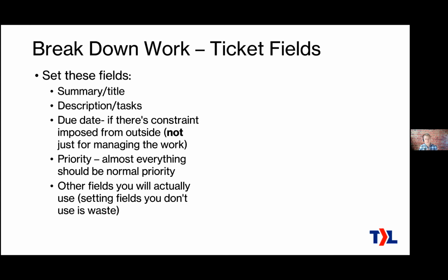That is not what the due date is for. The due date is for if there's an external constraint. Like, for example, maybe your project has to do with a conference and the conference is on a certain date, so you better be done by then or even earlier, okay? Because that conference date's not moving.